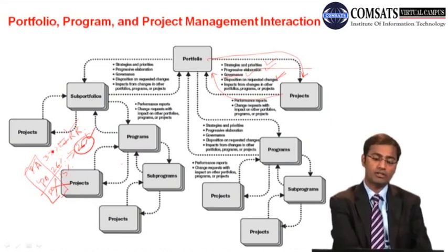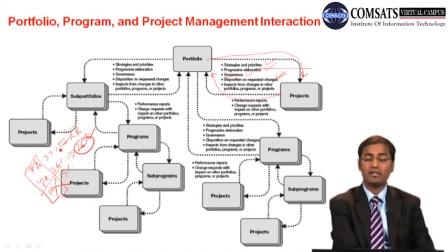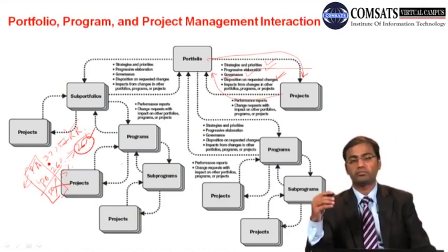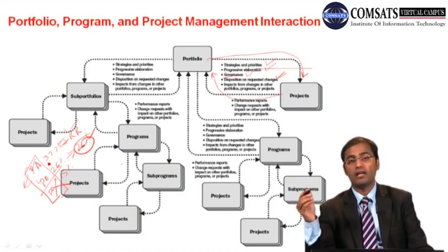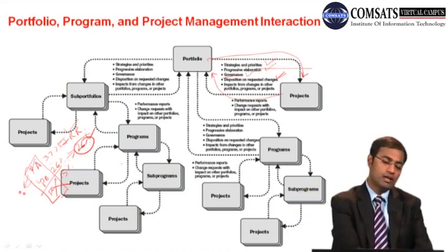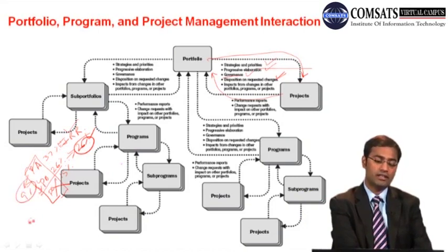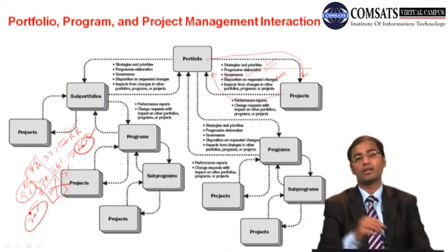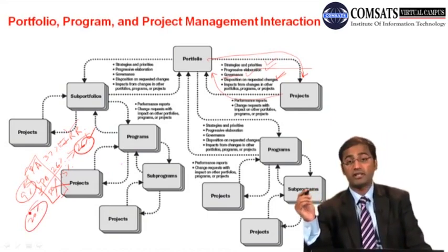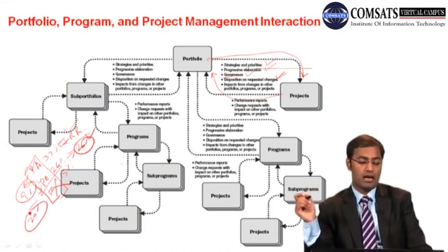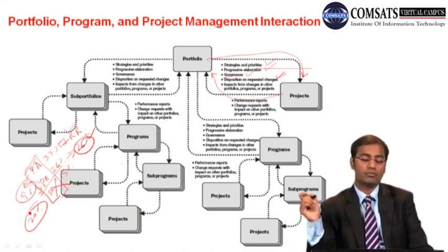But during the course of the project, we were anticipating a 37% financial IRR, but now, with the forecast after half the project is over, we have concluded that the financial internal rate of return for that project will reduce to about 9%. Now that is far less than the stated 20% strategic goal. So 9% is telling us something, and we need to carry out some corrective actions.